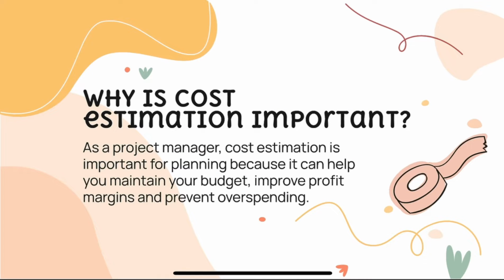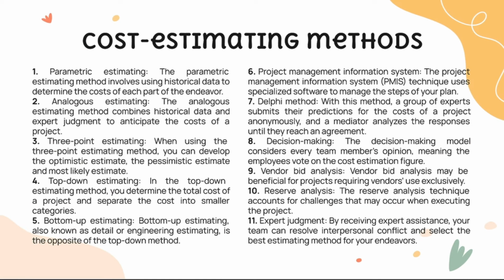But why is cost estimation important? As a project manager, cost estimation is important for planning because it can help you maintain your budget, improve profit margins, and prevent overspending. Now we have the cost estimating methods. The parametric estimating method involves using historical data to determine the cost of each part of the endeavor. The analogous estimating method combines historical data and expert judgment to anticipate the cost of a project.